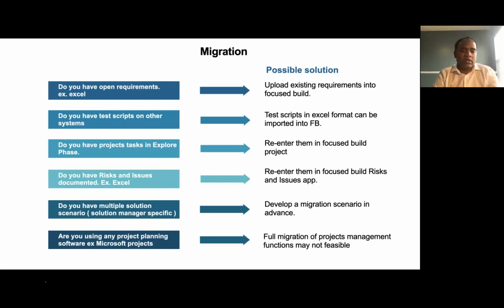But like I said, it's the application ITPPM, the project plan. It may not be as great as some of the project planning tools, but I would recommend doing this. At least put your explore tasks there, the things you're taking from the activate project plan per work stream, or at least the headlines, and put the status of those, so that everyone gets to know when your QA is getting built, and when you are doing client copies, or things like that, in the explore phase.